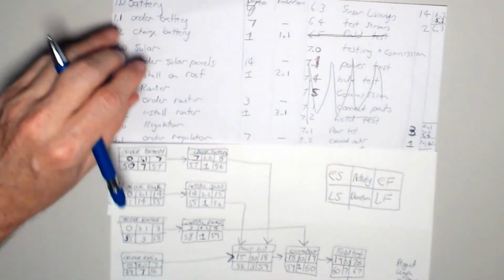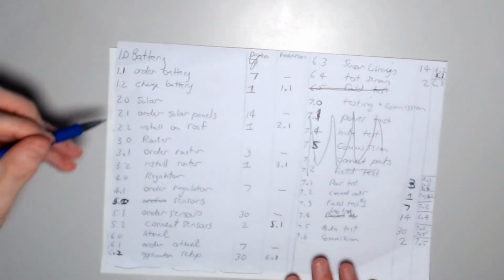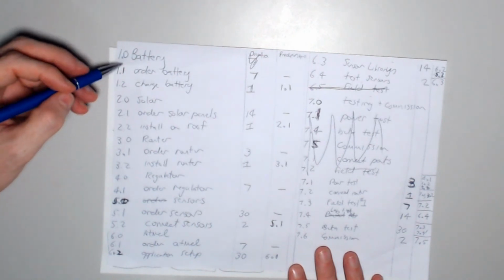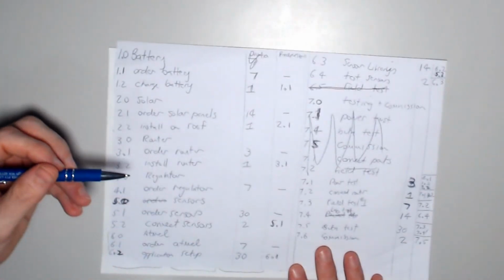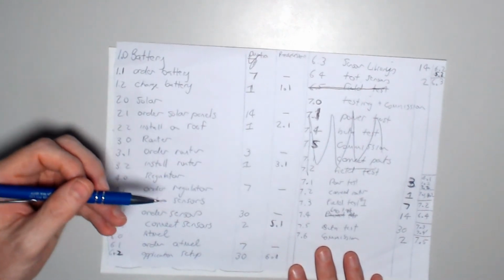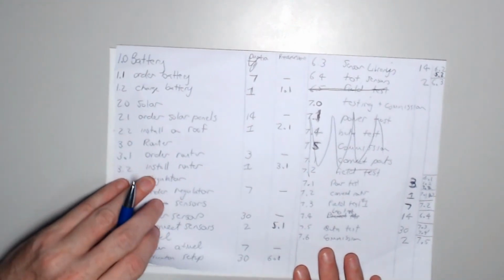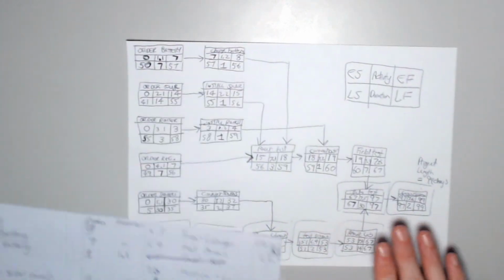And so when you finally go through the network diagram like that, you'll have your numbering, your activities, your durations, and your predecessors, and that's what you need for the Gantt chart. So you can plug that into software, and the Gantt chart will be generated along the same lines as this network diagram.